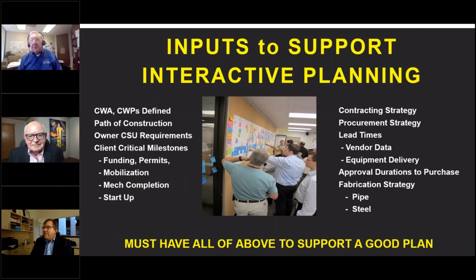Now, this is your inputs to support interactive planning. You're going to need a lot of information, especially in relation to funding, mobilization, mechanical completion, startup, your vendor data. Vendor data drives engineering. And that's going to be your big pinch point. In today's world with supply chain and shortages, it just looks like you cannot purchase your major equipment early enough to get the vendor data to the design team to get this thing going to support the path of construction. A lot of issues right here, and that's just a challenge for the entire industry.